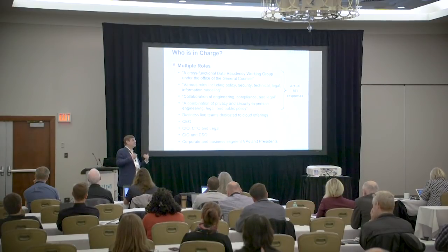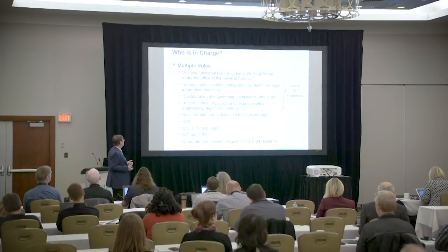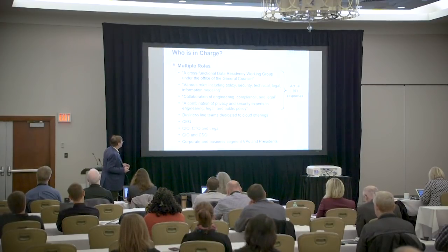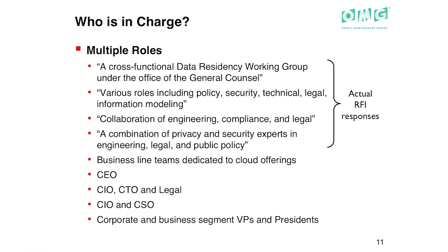And we all know from responsibility assignment matrices, the RACI principles, responsible, accountable, consulted, and informed, that you can have multiple people responsible for various things, but you need to have only one person or one role accountable. Otherwise, things won't happen. And it is very clear that the current state of the art, in commercial and government organizations, I think, also is that there is vagueness and uncertainty, and therefore insufficient management of the issue.